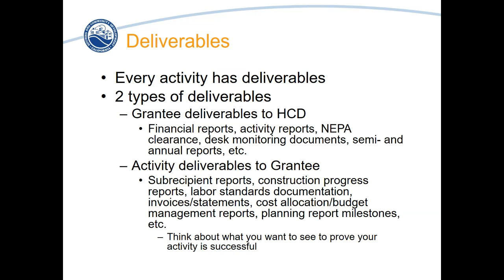Every activity is going to have deliverables, but there are really kind of two types of deliverables that you'll want to be thinking about. So there's your grantee deliverables to HCD. Those are the deliverables that you're going to provide to us. That would be your financial reports, your activity reports, your NEPA clearance, desk monitoring documents that'll be requested upon identifying who's getting desk monitoring, semi and annual reports. That'll also be invoices and financial documentation that you'll submit to support your financial reports.